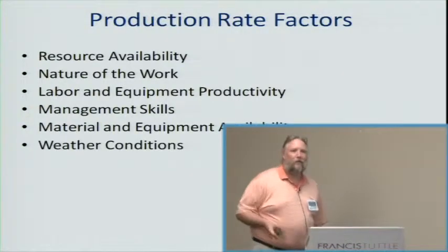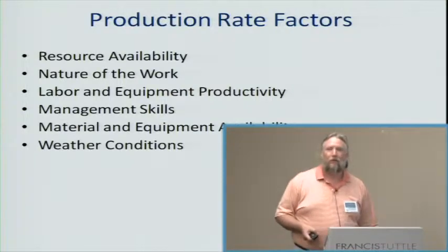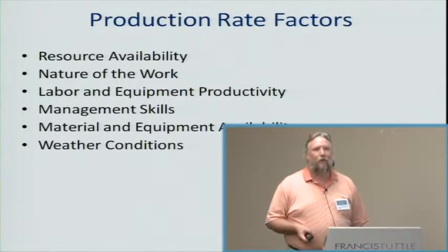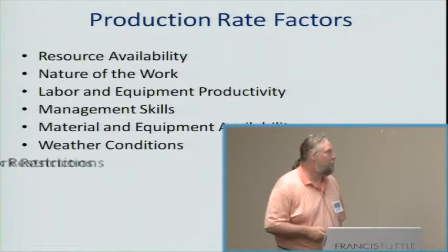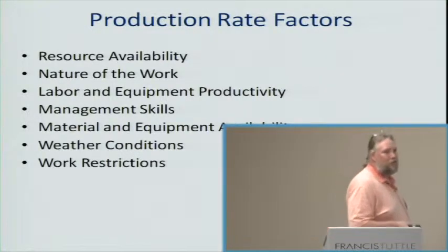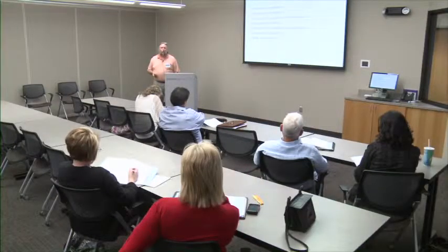The weather conditions make a difference. If it's raining and muddy, I can't move dirt, no matter how much I want to. If it's dry and dusty, I may not be able to move dirt because I don't have a water truck available. Work restrictions. I can only work between 8 and 5. I can't work on Saturdays. I can't work on Sundays.